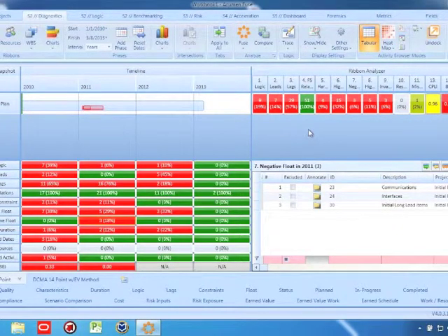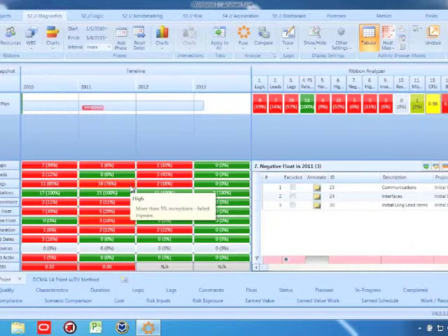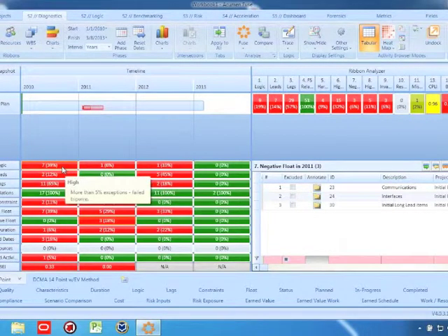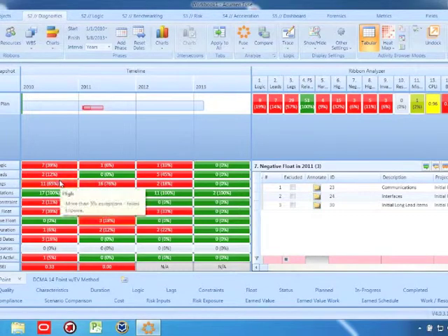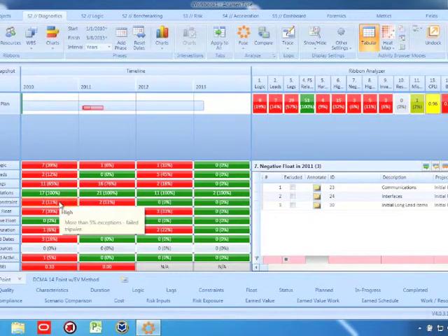The reason I mention all of this is, if you have the 14% score and this much red, I don't want you to send the CEFACT file yet. I want you to use a diagnostics tool to understand where your problems are and fix as many of those as possible before the CEFACT file gets sent to your customer.